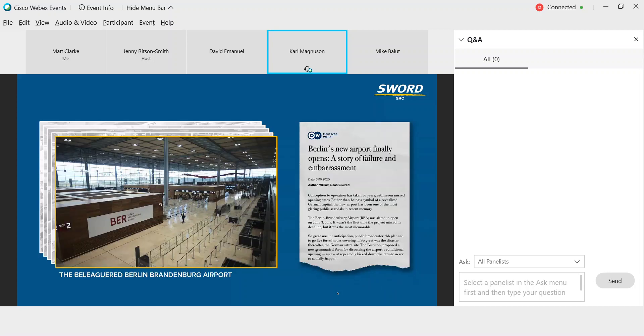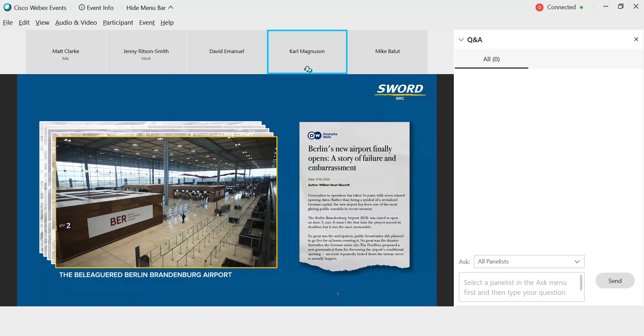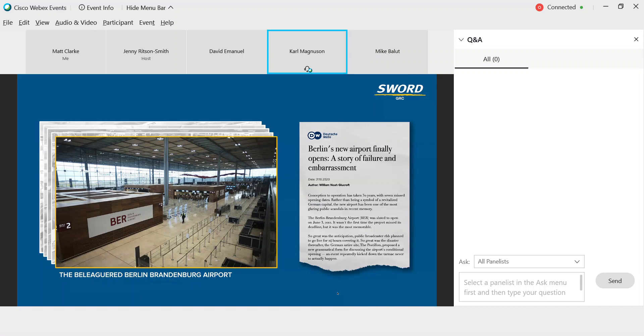After 15 years of feasibility and pre-planning, construction finally started in 2006 with expected completion in 2011 and a cost of 5.4 billion euros. The Berlin-Brandenburg Airport had many of the same types of problems as Heathrow and Denver. Additionally, scope creep has evolved here to such a significant level that it's almost scope leap. Changes included adding a complete second level with shops and restaurants and changing the configuration from a rectangle to a U-shape. Despite these major changes, the project has taken so long that features like USB charging ports weren't even considered.